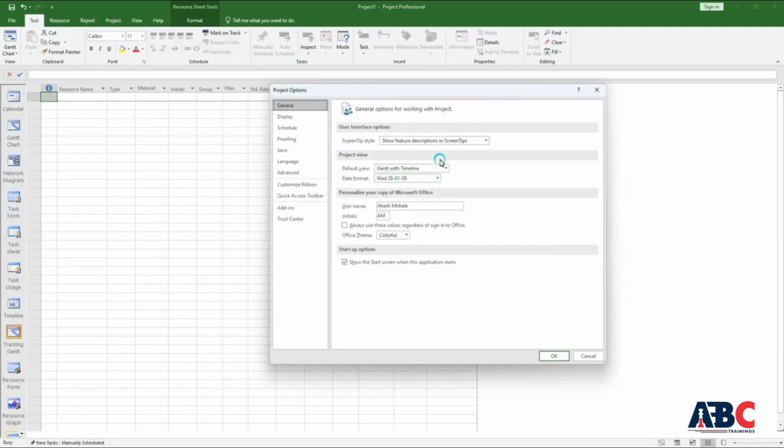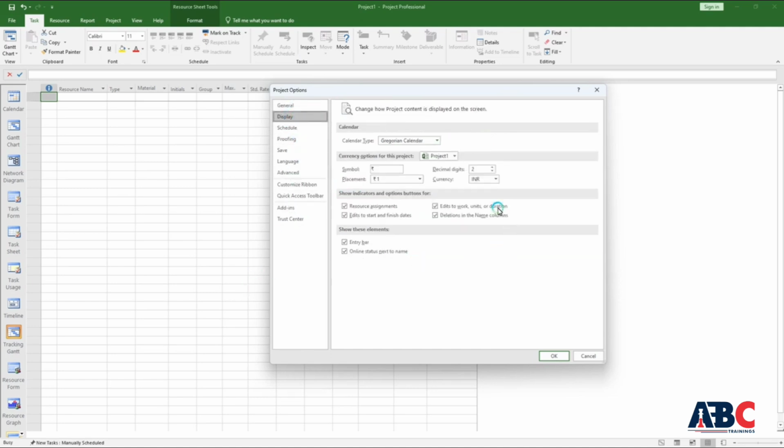So here, if you see in the display options, the cost or the currency will be open for the project. As soon as it opens, you will see different options like INR. Different countries' currencies are added. You can take whatever you want from here. Then, as with INR, you can see the symbol here, which you can change. To change it, you can simply type it in, or you can copy the symbol and paste it from the internet or Google.